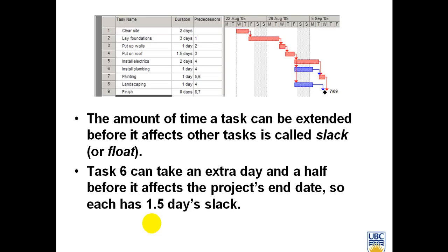This is very handy, because if you feel that you are short on another task, and you understand that these 2 tasks are floating tasks, maybe you can take some of the resources allocated to them for other tasks, causing a 1.5 day delay in these 2 tasks without causing any problem for the entire project timeline.